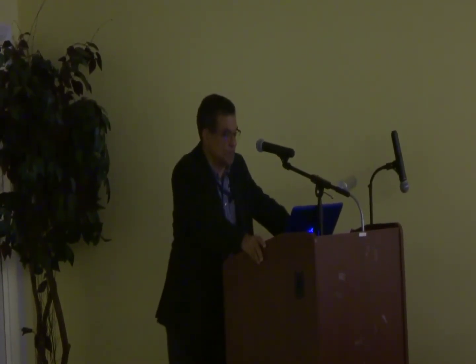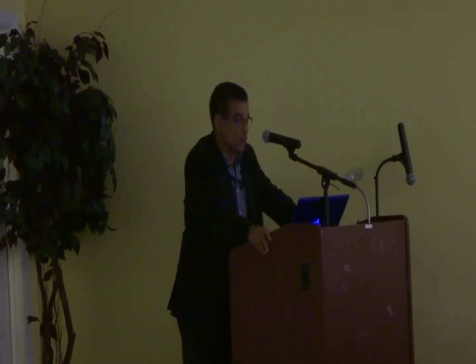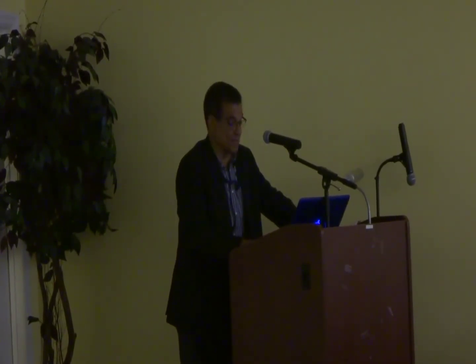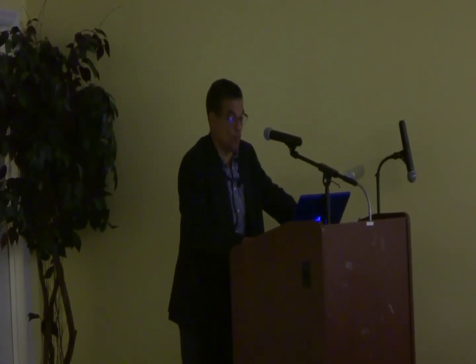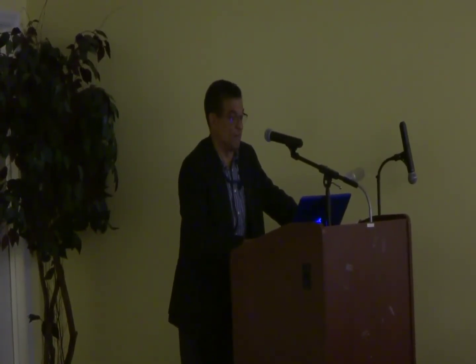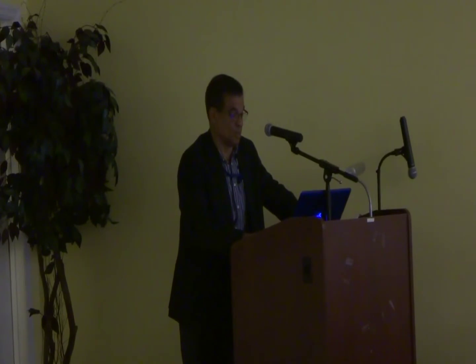Fixed price versus reimbursable prices. Prices are either lump sums or reimbursable. Methods of reimbursement include approximate quantities, schedule of rates, day work rates, provisional sums, PC sums, and cost plus. The object should be to minimize the reimbursable. You want to minimize this as much as possible, so a review of the scope must be done to minimize the amount of these items. You want to have firm and fixed quantities, not approximate, and the contractor's price should be as much as possible on firm and fixed quantities and a firm and fixed scope. So, you're looking at order of declining risk or increasing risk? What are you considering that?